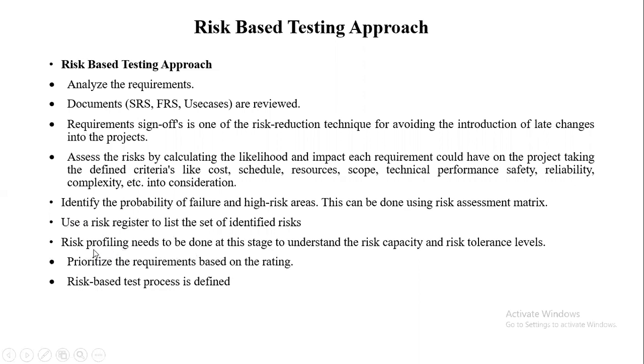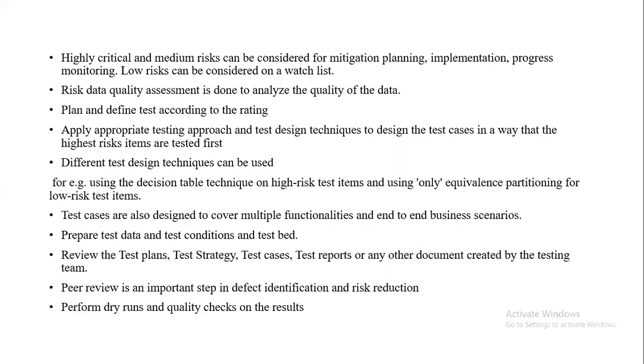And after that, we'll prioritize the requirements based on the rating. Okay, so a requirement with a high rating will be developed first, and the next one like that, and so on. And then the risk-based test process is always a defined process. Okay, so these are some of the important things. There are still many more on how to implement the risk-based testing approach. And the other thing is that highly critical and medium risks can be considered for mitigation planning, implementation, and then progress monitoring.